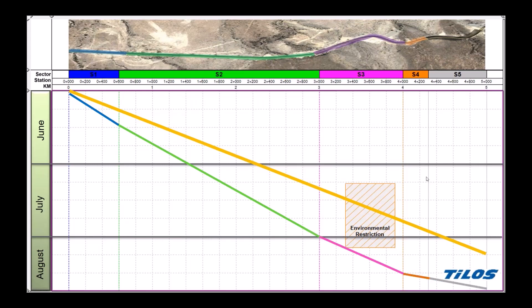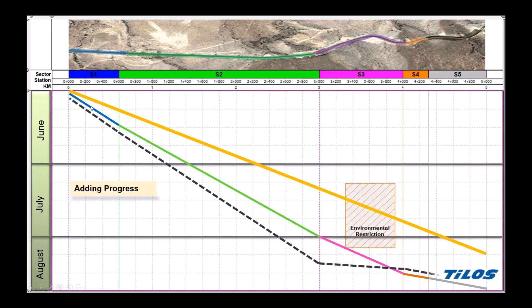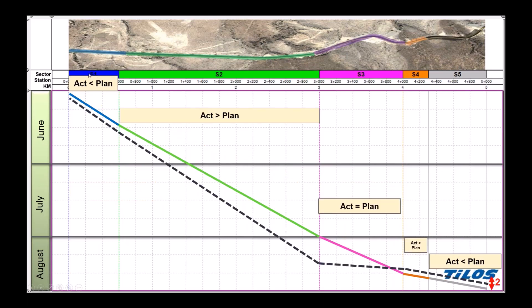So we could have a straight line, or different lines for different sections. We can also add progress — perhaps we are a little bit late, or working faster than the original plan. In the end, we can see that the progress actually done on site is two days ahead of the plan. It's good to measure the actual plan versus the progress.